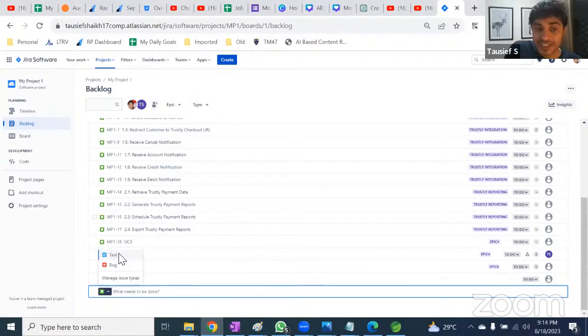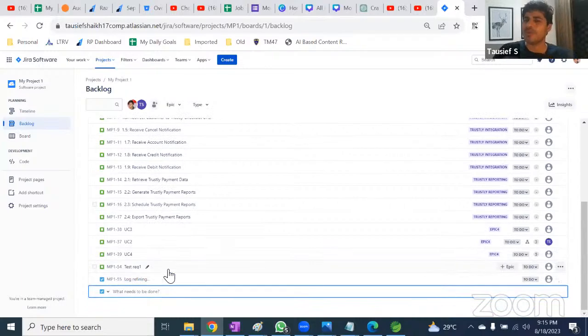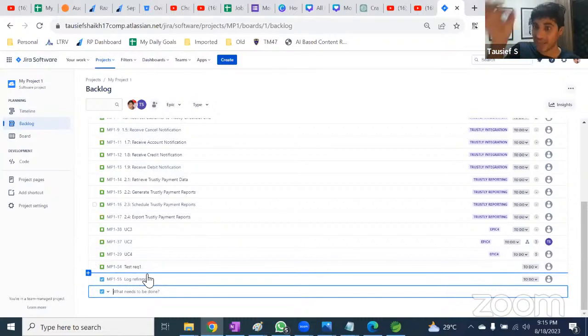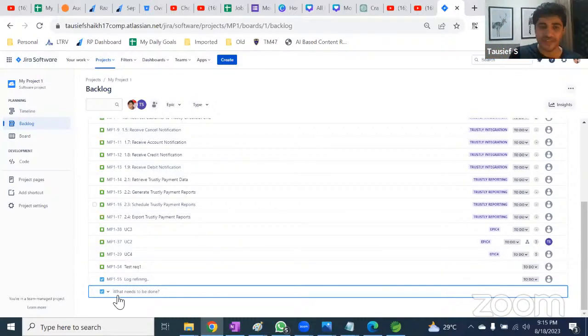Next, if the technical person is writing a requirement, you can tell this during the interview: in our team, if the technical person had a requirement, he would generally make it a task. What could be the requirement? He says, log refining. It is not coming as a business requirement, but the technical person knows that something in the logs is wrong and he has to correct it, and then he puts in a requirement like this. Or maybe refactoring. It is not business logic, but technical developers know they have to implement it. Such work can be considered a task, so it acts as a differentiation.